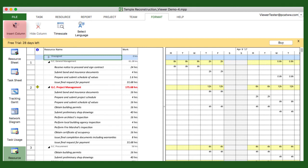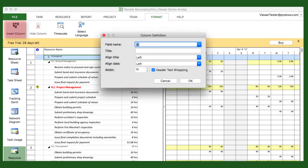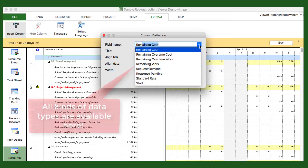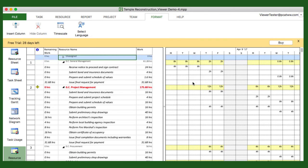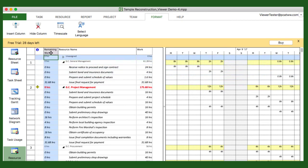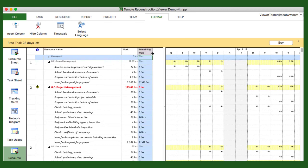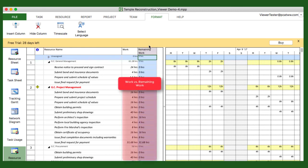Go to the Format ribbon, select Insert Column, and then pick the type of data you'd like to display. In this case, I'd like to see the remaining work side by side with the work. So I'll add the remaining work column, and then move it over next to the work column. Columns are dragged around just as they are in Excel. Now the work versus remaining work can easily be seen.